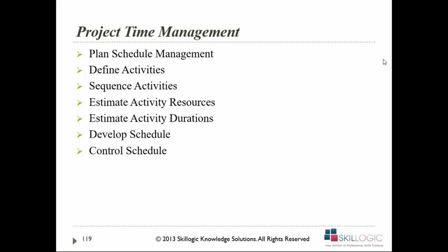So the change management procedure is very simple. If there is a change desired, either by you, your team members, your client, your project board, or any of the stakeholders, the change is logged. The change has to be logged using whatever procedure you have defined, if it's a portal or otherwise. Then the change is evaluated by you for its impact in terms of time, cost, and risk. So we evaluate the impact of the change.